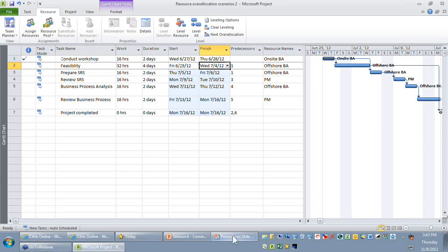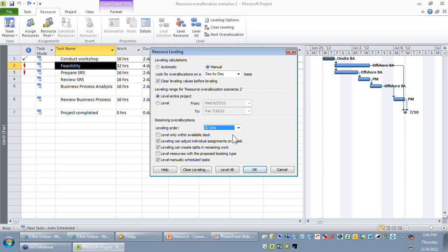So I recommend you go for an ID only option if you have designed your plan such that the most critical activities in your project are positioned at the beginning of the plan, or maybe the less priority activities are designed or put at the later part of your schedule. But not normally everybody will design a plan that way. So mostly ID only is rarely used.